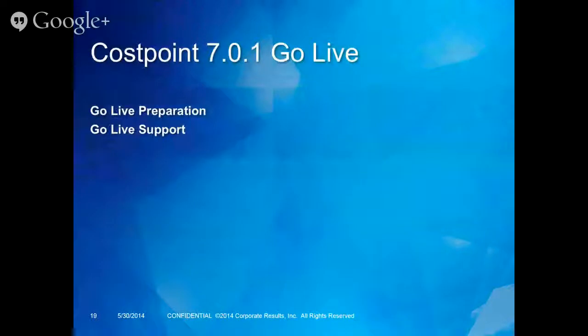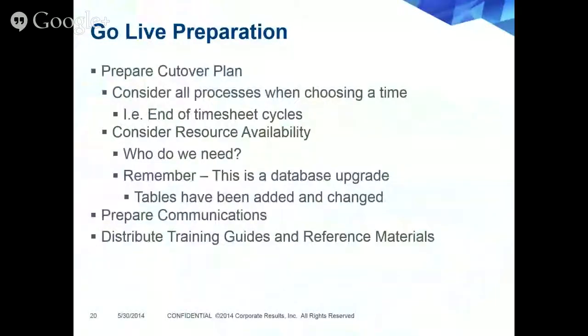Okay, Costpoint 7 Go Live. We have Go Live Prep and Go Live Support. First up for Go Live is to prepare a cutover plan. So that's going to be who do you need and when do you need them.